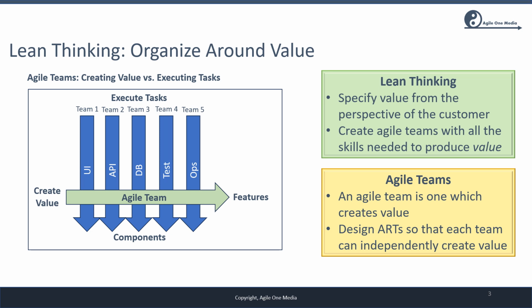So the disadvantage of organizing along these lines is that none of these teams individually creates anything that can be consumed by a customer. Each team creates a component of the solution, which then needs to be integrated with components from other teams before anything of value can be delivered. In fact, these functional organizational structures can impede the creation of value because of the presence of dependencies, handoffs, and resulting delays.